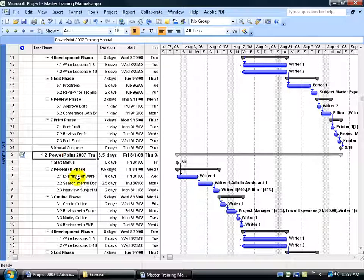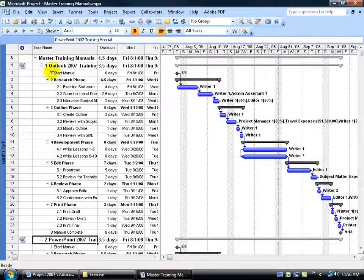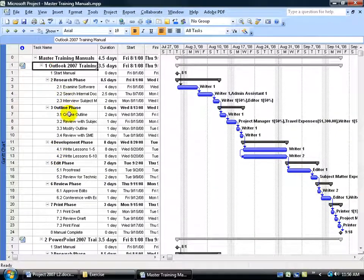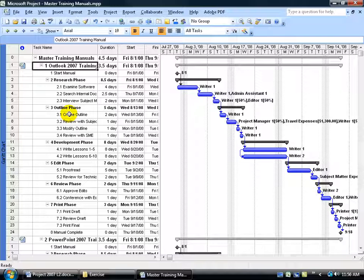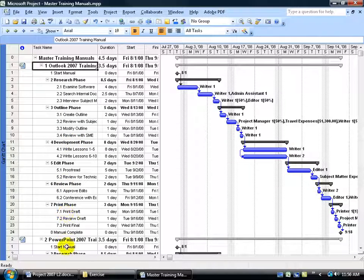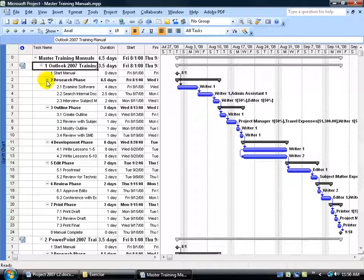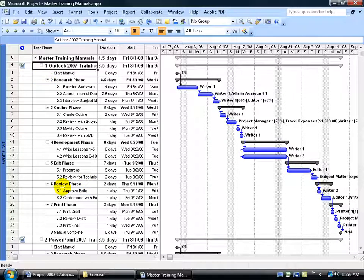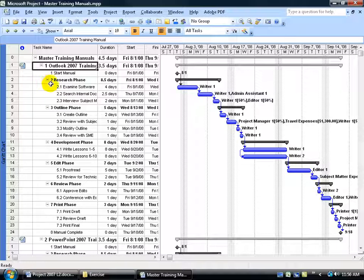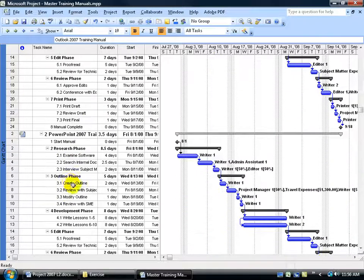Notice the inserted projects are broken down here as the second project and the first one. What if I create my own custom WBS code which defines this is the first project on all the tasks for this project, and this is the second project for all the tasks on the second project. What I would do is create a WBS code that says this is all project 1, then have a dash and continue with the work breakdown structure. So project 1 dash 2, project 1 dash 2.1, project 1 dash 2.2.